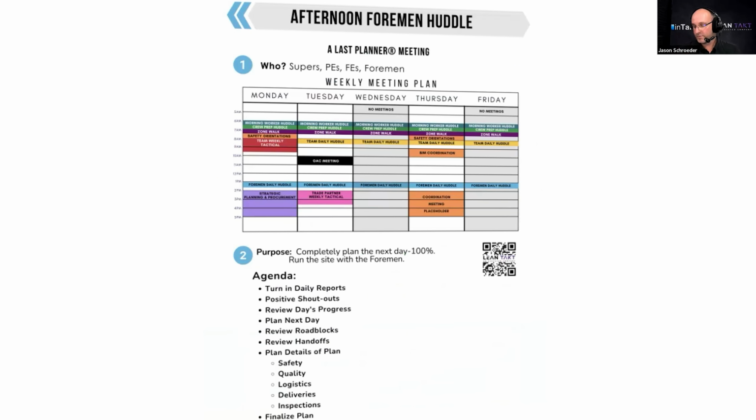When people talk about morning Foreman huddles, that's not a Foreman huddle. That's a morning team, here's-what-I'm-doing huddle. There are no decisions being made. There are no reroutes, no changes, no gathering of resources. If you're actually going to change the plan, adjust the work, get resources, or do something dynamic, you have to know the day before.